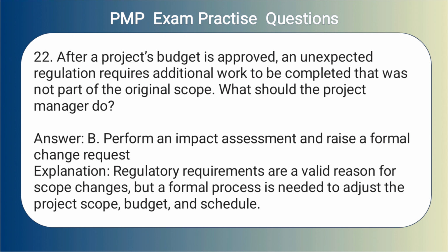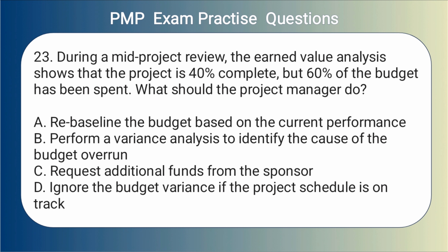Answer: B. Perform an impact assessment and raise a formal change request. Explanation: regulatory requirements are a valid reason for scope changes, but a formal process is needed to adjust the project scope, budget, and schedule.